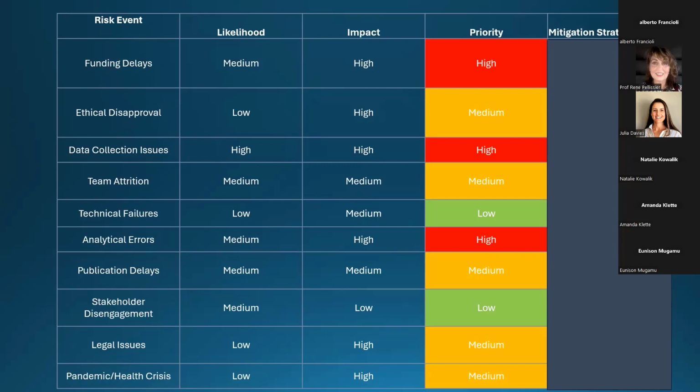However I want to. For me personally, I would put the numbers as far apart as I can, because that makes the priority areas easier to identify. So I can say low is a 1, medium is a 10, high is a 20 if I wanted to, so long as I'm consistent. Then I multiply the likelihoods and the impacts, and the number on the right, I know at the moment it's not a number, but I've done that already.